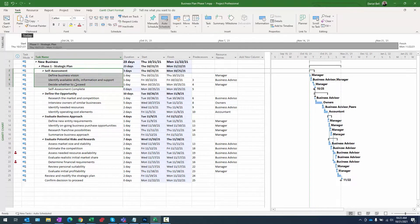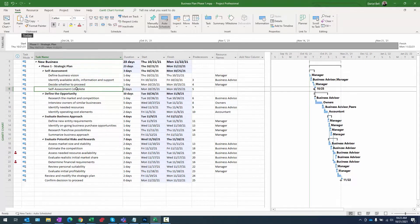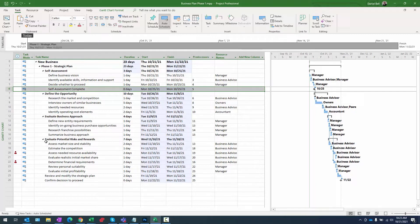That is the milestone — 'self assessment complete' — and what it really denotes is the completion of all the activities within that phase. If I want a downstream task to have the completion of self-assessment as a predecessor, I can just link to that one task, row six.